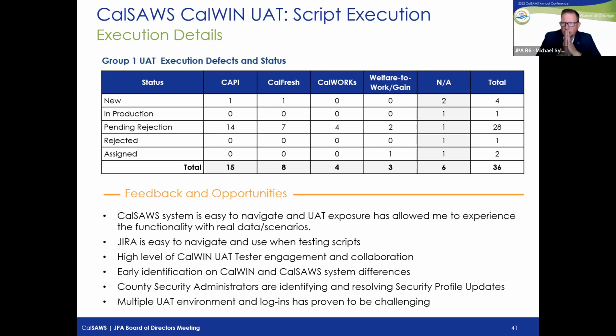Thanks, Lori. John, I wanted to mention, I like the transparency and the admission of the multiple environment challenges. I really implore the project to keep pursuing how to streamline that. We had similar issues when we were doing UAT for LRS doing the conversion, and it does impede the project's ability to get the right feedback from that UAT group when they're struggling to get access to the environments, and sometimes they lose days and maybe even weeks. So whatever can be done about trying to streamline that, we're really supportive of.